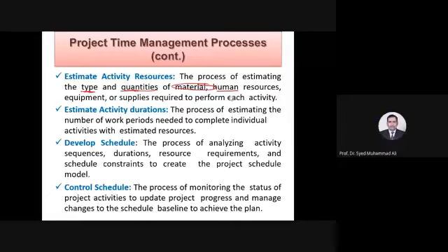So please keep in mind, I am telling you, there will be a resource sheet where you are going to define all these resources which I have just explained. Then you have to give their unit cost as well. For example, if I am deploying an engineer, then the charge rate for engineer will be, for example, 2,000 rupees per hour. If the mason is deployed, the charge rate is 1,000 rupees per hour.